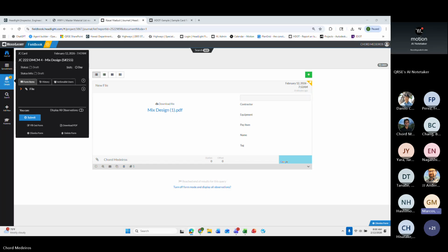Yes. Yeah, what about the scenario of lab rejecting a course that is lesser than, let's say, 93? Yep. Right now the acceptable compaction is 93, right? But if it's 92, so they reject it. But technically we can accept that with a reduced payment, right? So how would you? Yep. So in Headlight, they rejected it, but what would you do at ACC? Would you also say rejection? Yeah.